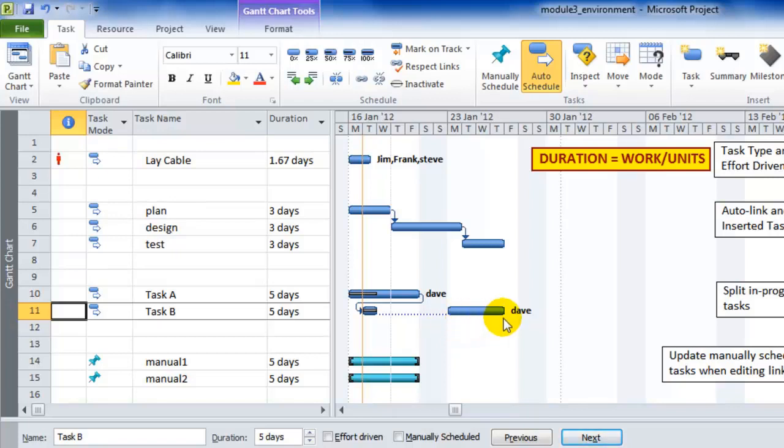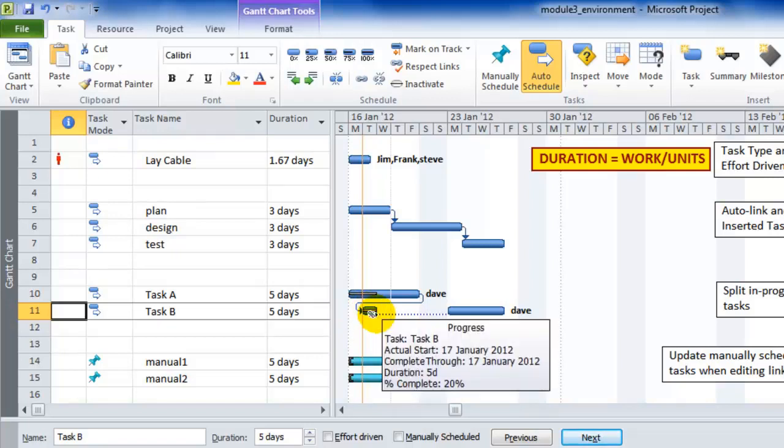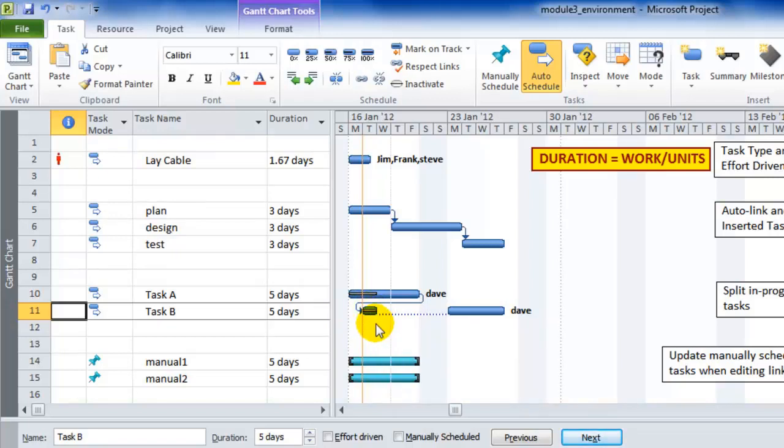It just has 4 days planned for next week rather than the 5 days due to the fact we've done 1 now. So it's your choice whether you want to show the fact that if you have the opportunity to start tasks earlier that have some link between them, a successor-predecessor link, then you can check that box to make this happen. Okay, let's move on.